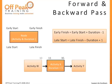This will influence the early start of all successor activities. Once we have found the early start and early finish for all nodes, the forward pass is complete. Next, we will perform the backward pass to determine the late finish and the late start for each node. Late finish represents the latest an activity can finish without affecting the planned project completion date. This can be thought of as a procrastination date — if I had to finish an activity at the latest possible moment without causing delay, what would it be?